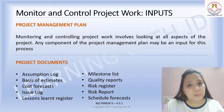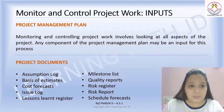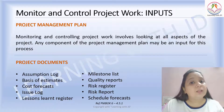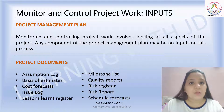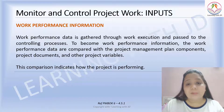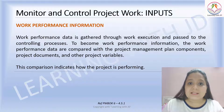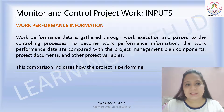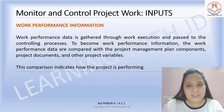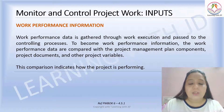The project management plan includes all the subsidiary management plans, all the baselines, and other components such as the change management system and configuration management system. You also need your project documents — assumption logs, basis of estimate, milestone list, quality reports, and schedule forecast. Then you need work performance information. Work performance data is collected through the work execution section and passed on to the controlling processes — when that data is passed on, it is known as work performance information.